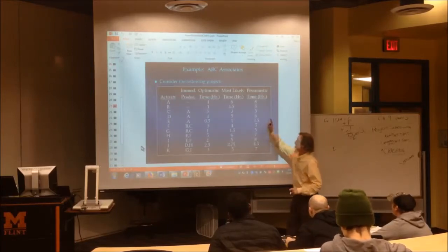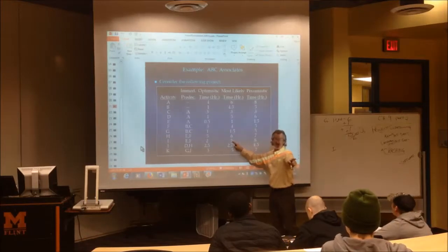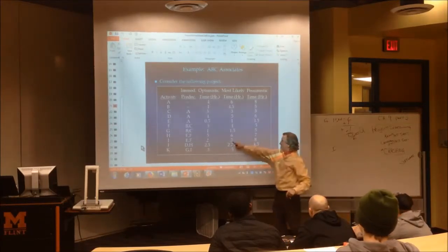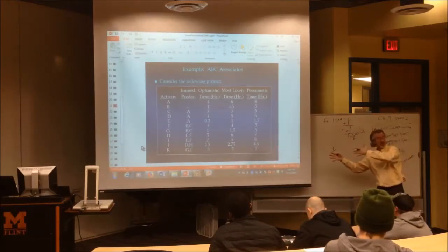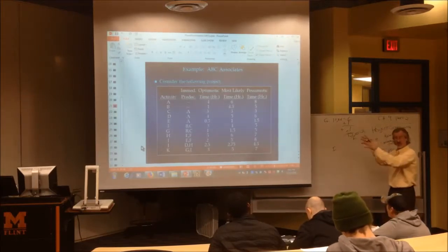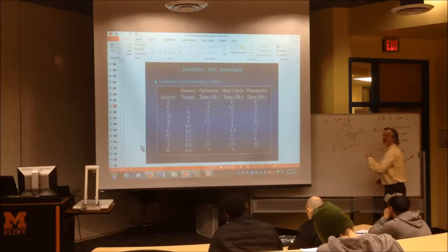No, that's if we were doing the expected time. But we want to do the variance. Do the variance formula. Not 5 minus 2, but 8 minus 2. The longest amount of time minus the shortest amount of time. Most probable is not even in this formula. Those 2. So in this case, 8 minus 2 equals 6. What's the next step?